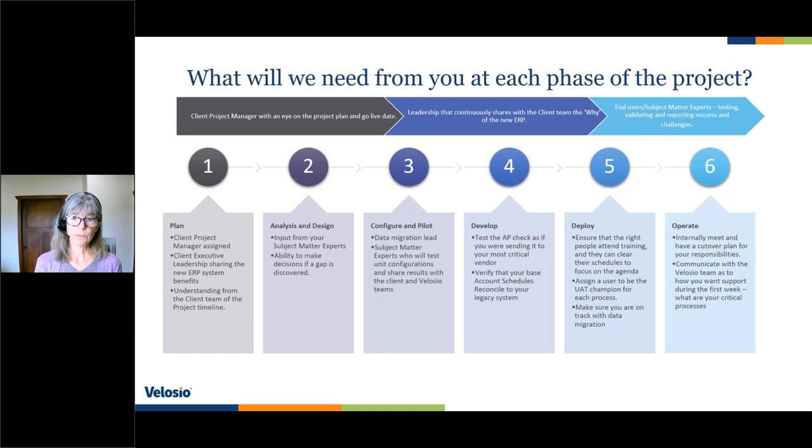We also need people to have a UAT champion. So somebody who's able to look at each of your process flows and think about, if the script isn't already one of our standards, what else should you be testing? What else should I test? What else is important to me? So we need somebody who can really own that process, and make sure that somebody's updating that script list so we're on track.